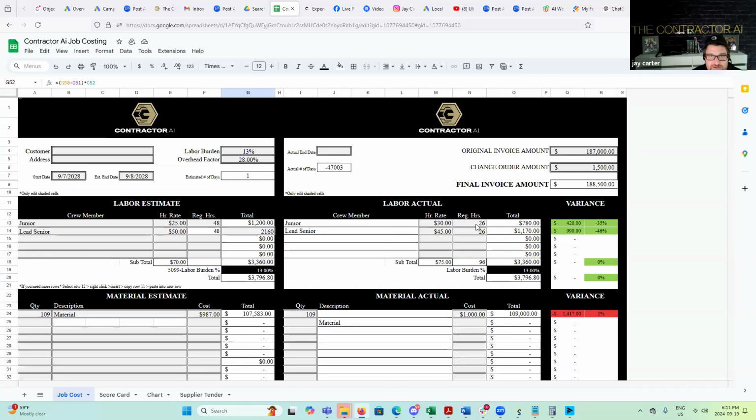What have I just done? You shared the wealth. I shared the wealth, yes. But again, think about it, my cost was already my cost. The way I look at it is, if I hired a subcontractor, this is what I would pay. I take that number and break that down to the hours, and then whatever they've come in below that.